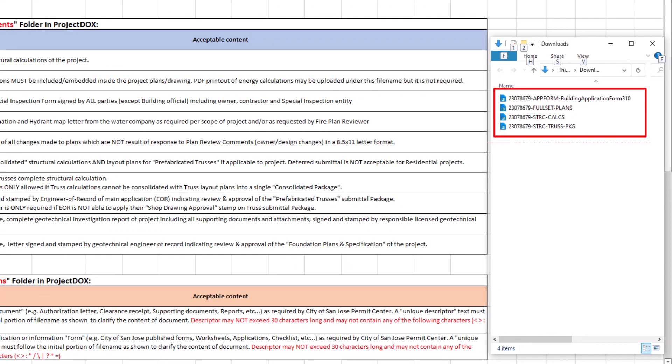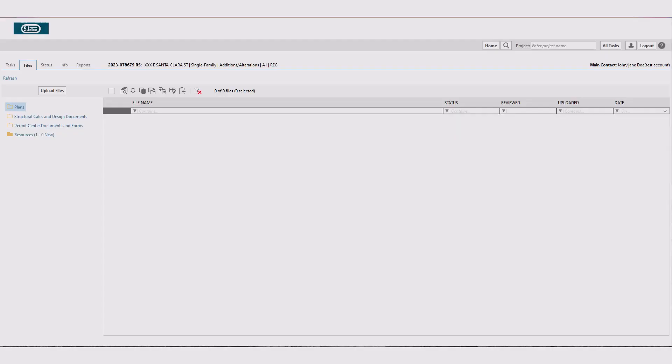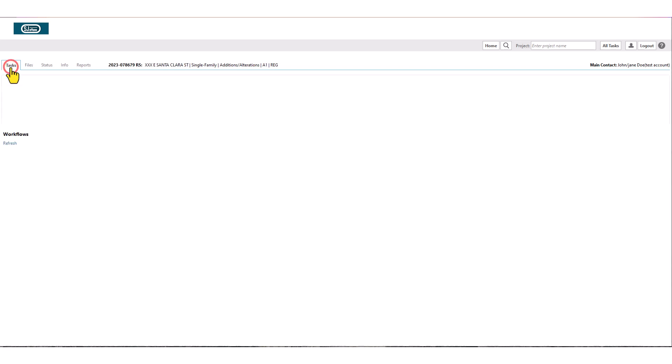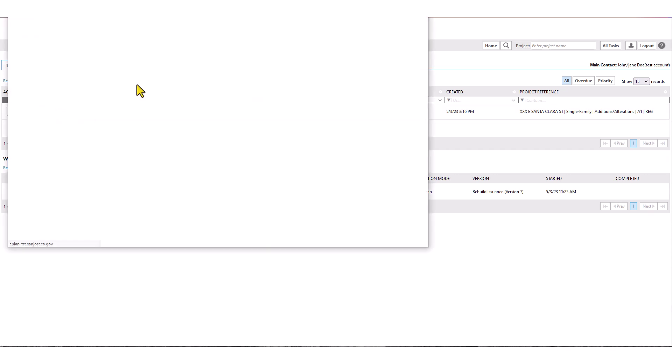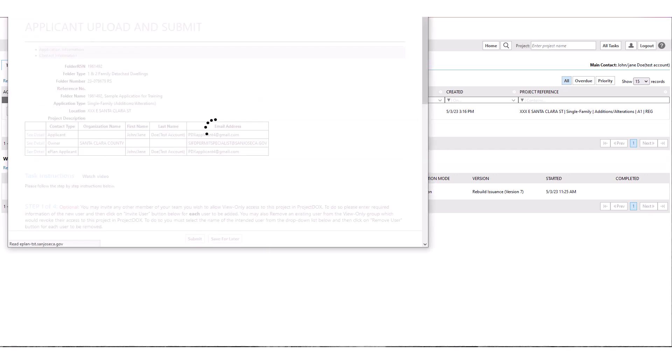Please note, except for descriptor text for permit center application forms or documents, all other filenames shall be in uppercase. When you have completed naming of the submittal files, go back to Project Docs and navigate to Task tab. Then click on the Upload and Submit Task link. Task eForm will reopen.